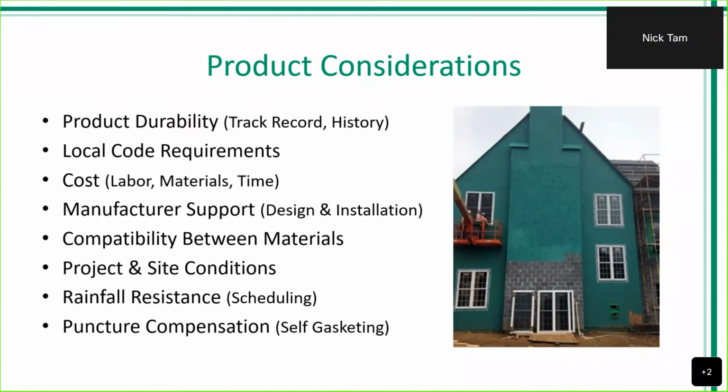Also, we want to make sure that it is meeting local code requirements. We know that with a variety of different hygrothermic regions, there are going to be specific codes that relate to them. Also, when it relates to cost, it's not just going to relate to the material alone. The material is going to help dictate the labor that it takes to install it, as well as the time it takes to install it. And so we all know that labor costs money, and we know that if we extend the schedule of our project, that can cost money as well. So we had to factor all this in together.